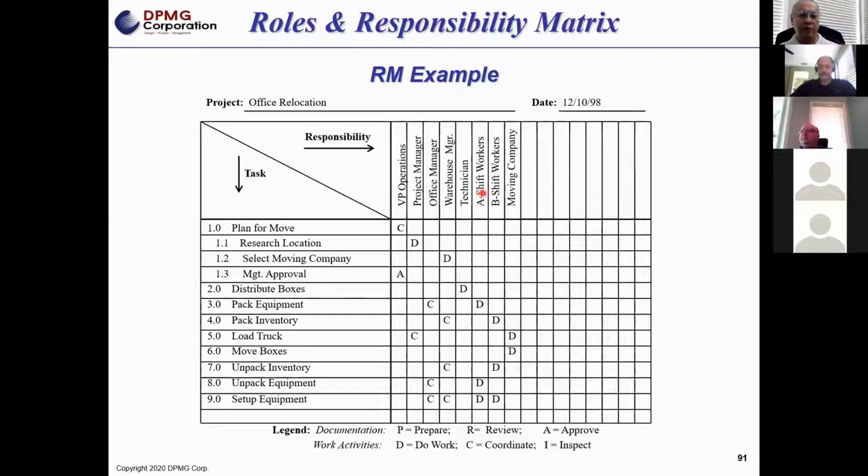Who all is going to be involved on the project. And then on the left-hand side, you list the tasks or the activities. What I've seen many do is, across the top, you've divided your project by function, by project phase. You can just have the project phases, and then list who's responsible for that phase. So this is one example.